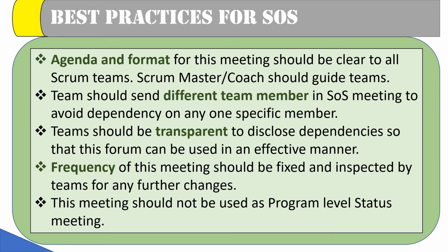Now let's talk about the best practices for the SOS meeting. The first thing is that the agenda and format for this meeting should be clear to all the Scrum teams. Each team must know, if they are attending the SOS meeting, what the agenda is all about and what they want to disclose in the SOS forum. The Scrum Master and coach should guide the teams. Teams should send different team members to the SOS meeting to avoid dependency on any one specific member. It's not like we designate one person who attends the SOS meeting every time. We need to avoid that dependency and encourage our team, because Agile is all about self-organized, self-managed teams, and at the same time we want to ensure that each team member is aware of the team's progress.